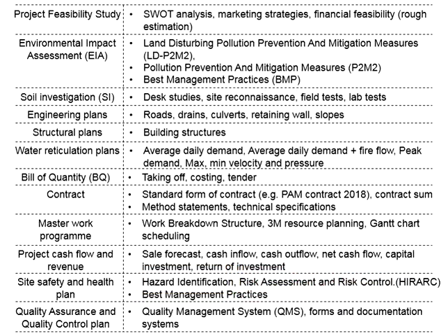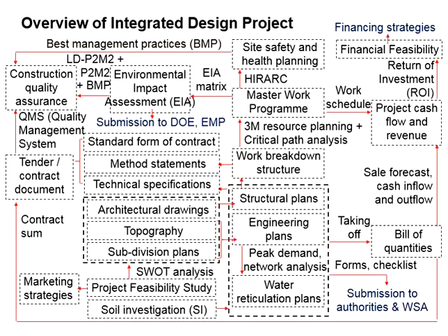It is basically an analysis studying the work activities, identifying the potential hazards, forecasting the potential risks, and significant risks shall have to follow up with the control measures, either to prevent the hazard or to minimize the impacts of the hazard. Top priority will be to prevent the occurrence of the hazard.